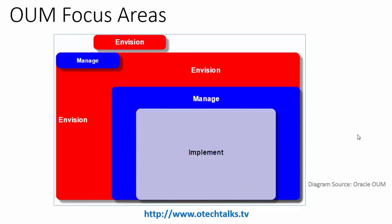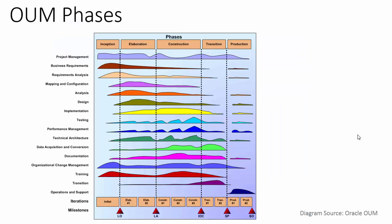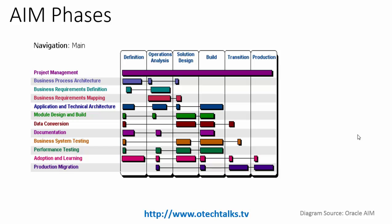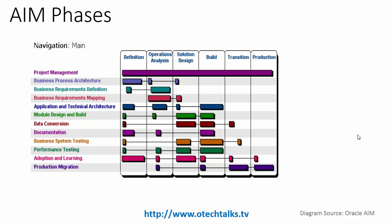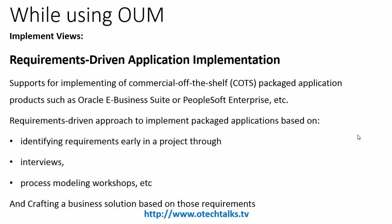The OUM phases are: Inception, Elaboration, Construction, Transition, and Production. Comparing this to AIM, which used: Definition, Operations Analysis, Solution Design, Build, Transition, and Production. OUM changed the entire phase names and the tasks within each phase. You can also see different workstreams such as project management and business requirements mapped across these phases.